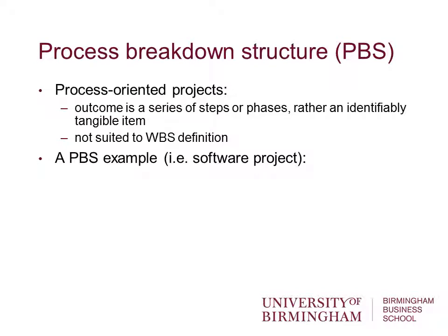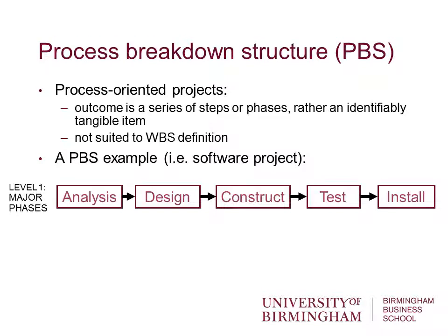You can also have process breakdown structures. These are sometimes used in projects, particularly for process-oriented kinds of project, like software projects and those sort of things. The sort of approach we might use is something like this, where you can see there is some sort of logic in the process, but then these will quite possibly be reiterated, particularly for software projects where part of the project is delivered, then another part, using maybe an agile project management system.